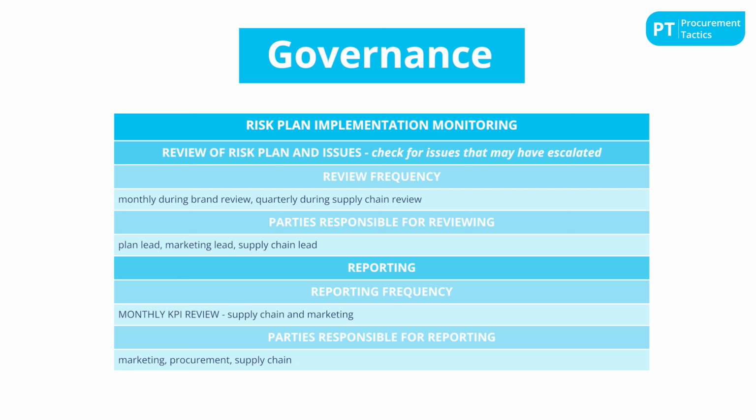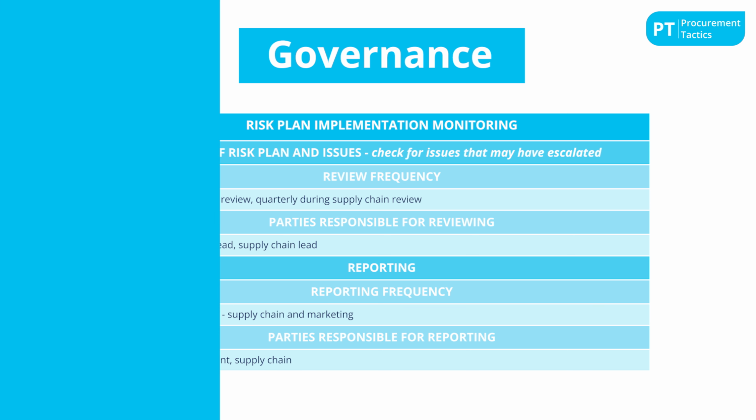of specific tasks. We also recommend clearly defining the cadence of the meetings where you review the risk register and mitigation plan's status. With proper governance, you ensure timely informing, discussing, and aligning risk mitigation plans. It also supports governing plan implementation and overcoming any challenges that may arise along the way. You can now start building your own BCP for your risk, leveraging this template created by our team.